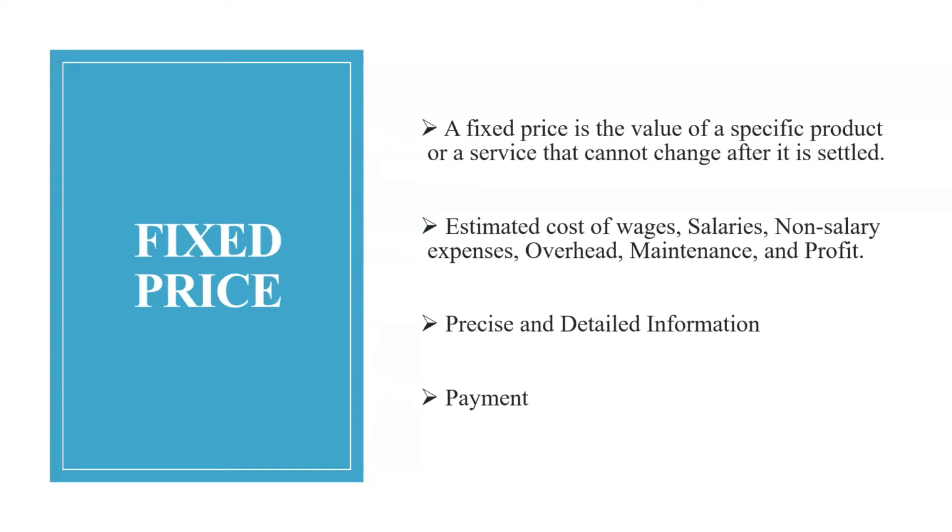The fixed price expense can be determined as the summation of the estimated costs of wages, salaries, non-salary expenses, overhead, maintenance, and profit. A fixed price contract should include precise and detailed information of the schedule during the construction of the project and the negation of modification compensation.